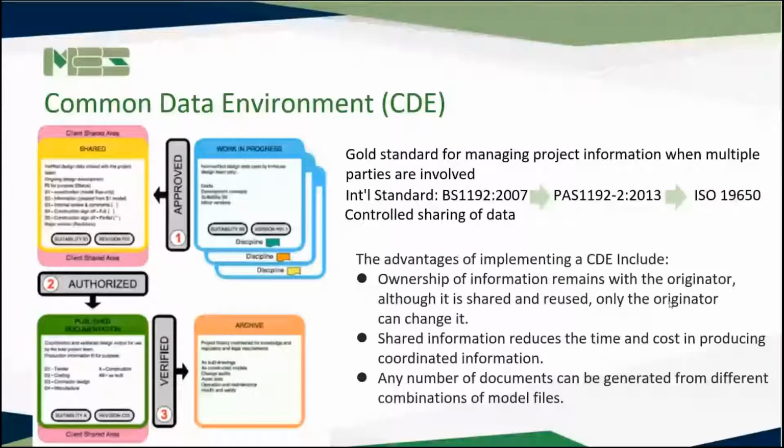CDE is the golden standard for managing project information when multiple parties are involved. This was originally defined in BS 1192, then in PAS 1192. Finally, it had its international standard, ISO 19650. It is built on the principle of the controlled sharing of data once certain checks have been made.